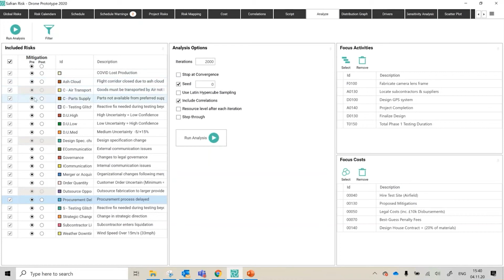The grey boxes that are around some of those risks, notice this is the opportunity that we looked at on one of the slides earlier, which was where we had the mitigation with the optioneering presentation, but we had it as an alternate position based on action. So these 3 grey boxes represent all of those places where the mitigation measure drives if it is a pre or it is a post mitigated position. So if I don't want to see a grey box there, I'll have to go back to the risk register and untoggle that.